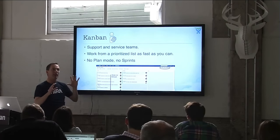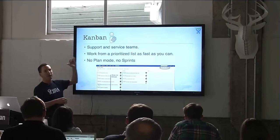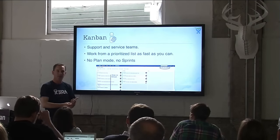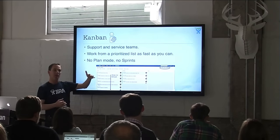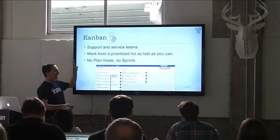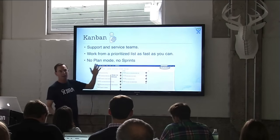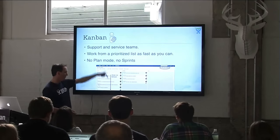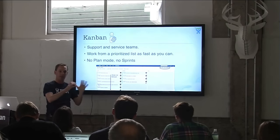Kanban teams are like Scrum teams except they don't have a target date they're working toward. Support and service teams are generally teams with a list of work that's always getting new items, and they prioritize it and work through it as fast as they can. With a service team, how many tickets are going to be done by next Friday is way less important than making sure they're in the right order and the team is working through them as fast as they can. Kanban doesn't have a plan mode — you just prioritize and work as fast as you can. Your to-do list in a Kanban board goes on forever, whereas in Scrum your to-do list is only the things you've decided to do in this sprint.